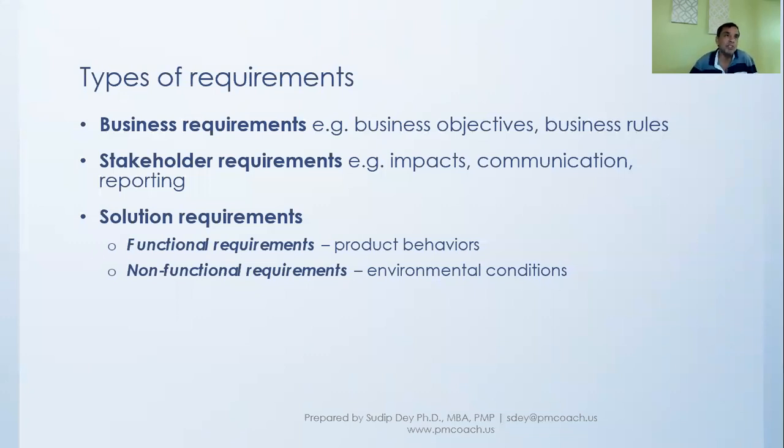And oftentimes, unless you explicitly talk about it, these non-functional requirements might not even come up in the discussion. For example, here, what should be the speed? This is the kind of requirement that you should look at: within what time should a page get loaded?